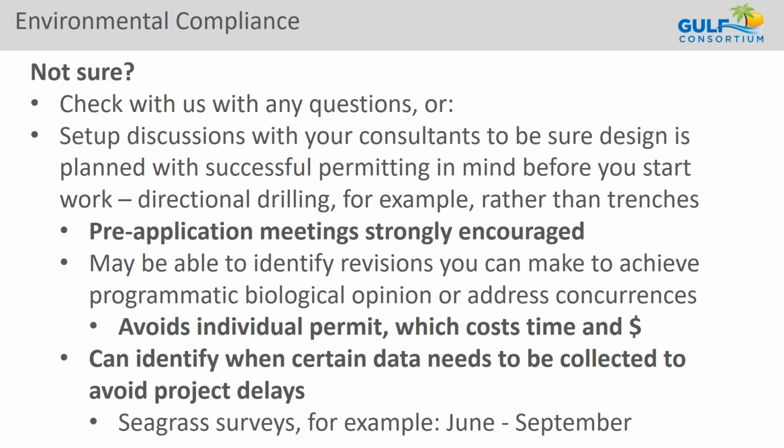Even these pre-application meetings, through this interagency group, are very much encouraged, because they can make sure design happens in a way that will help the permitting happen more easily. For example, if you need seagrass surveys done, they need to be done at a certain time of year. Likely the surveyors or your consultant will know that, but it's good if we get as much information as we can, so we're managing that correctly.